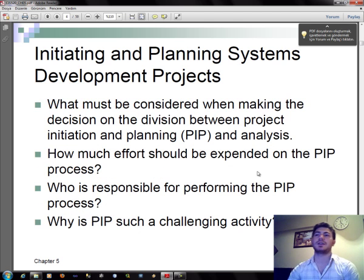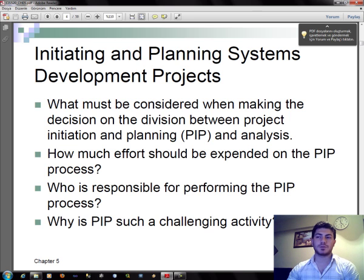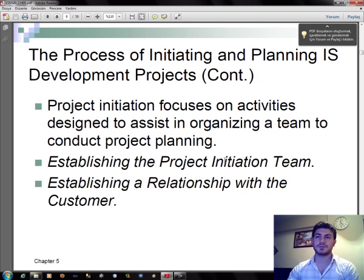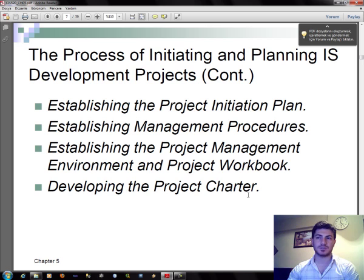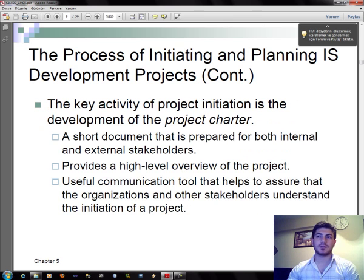Now let's start the initiating and planning systems development project. Project initiation focuses on activities designed to assist in organizing a team to conduct project planning: establishing the project initiation team, establishing a relationship with the customer, establishing the project initiation plan, managing the project management environment and project workbook, and developing the project charter. The key activity of project initiation is the development of the project charter.